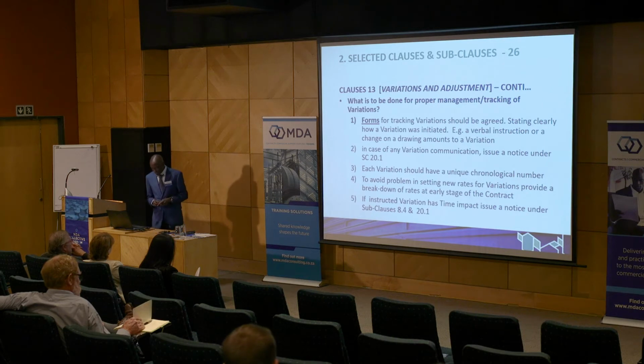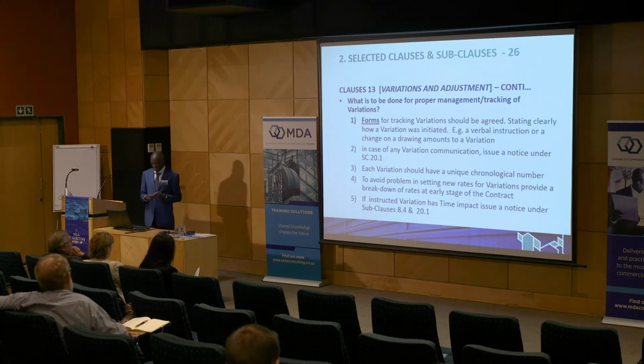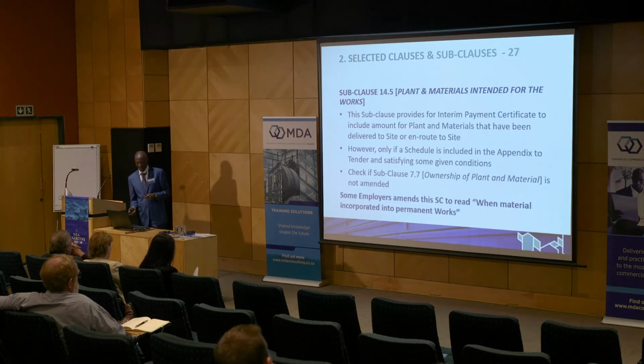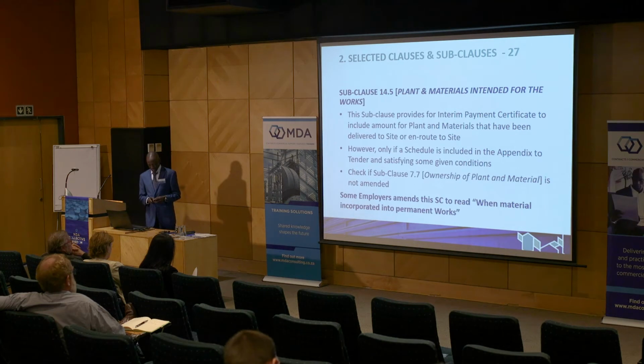Again, if the instructed variation has a time impact, the contractor should issue a notice under subclause 20.1 and 8.4 for his right to claim for extension of time and the additional cost.